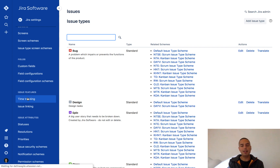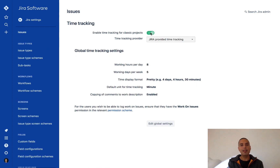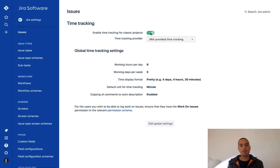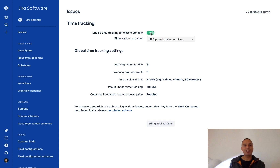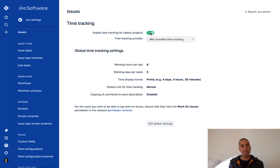If you click on Time Tracking, you can enable or disable time tracking for classic projects. Then you can select a bunch of things: working hours per day, per week, how you want to display stuff, and your default units. So this is how you enable and disable time tracking in case you don't have it — but you need to have admin permission.